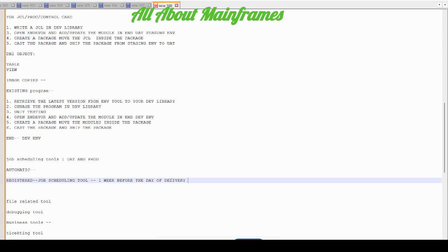Whether it is UAT or production, you have to schedule the job 1 week before delivery. Schedule as in you have to raise the request of scheduling. For example, your day of delivery is 1st of June, production delivery. By 25th of May, you have to raise a ticket and request the admin team of job scheduling team, the tool, to schedule the job on 1st of June. You have to tell them that 1st of June is our production delivery date, so please keep the job ready from 1st of June so that from 2nd of June morning it runs automatically. This request has to be raised 1 week before because they don't entertain immediate requests. If you raise a request today and ask them to do it tomorrow, they will not do it.